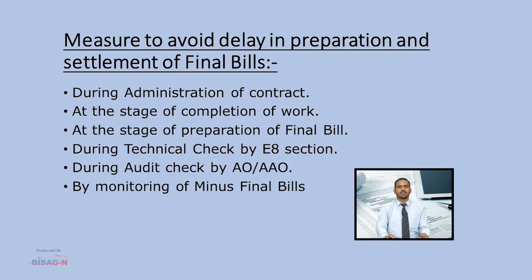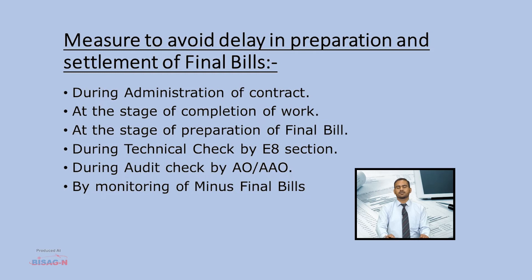To avoid delay in preparation and settlement of final bills during administration of contract, GE and CWE should make a periodical review at regular intervals for progress made on finalization of deviation orders, star rates, and amendments to contracts. A DO register shall be maintained by the engineer in charge. Possible deviations in the contract shall be identified in the early stage of work execution and finalized with concerned HQs on priority basis.